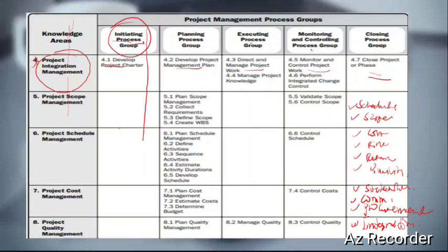And what is the first thing that he should do? One of them is basically getting the charter. For you to get an understanding of the work, you take the charter. And in some organizations, the charter would be written by the sponsor or somebody above the project manager, even without the involvement of the project manager. So when you walk in, the charter is fait accompli, it's done. So they hand the charter to you, and you will take your time to go through it to understand exactly what you have to do. High level, it's not detailed. They are telling you the project summary budget is about $1 million. But it's your job to take your time and break the work down to check whether the 1 million stated in the charter would be enough for the project.